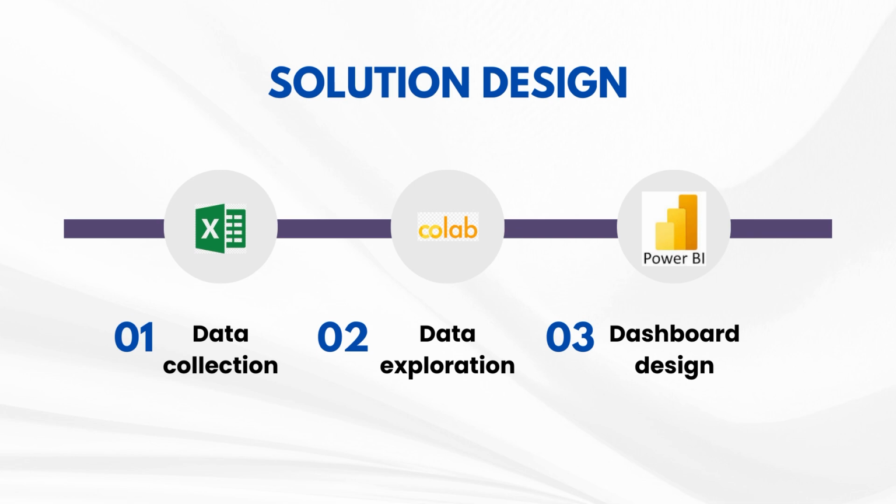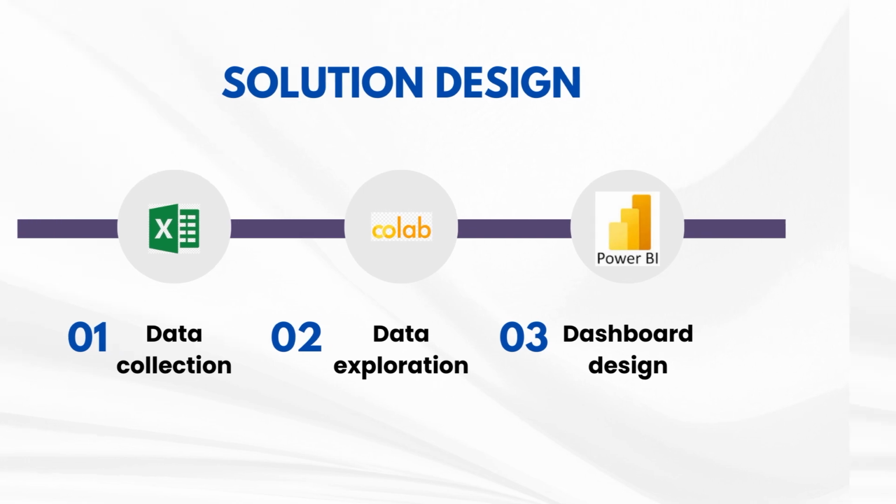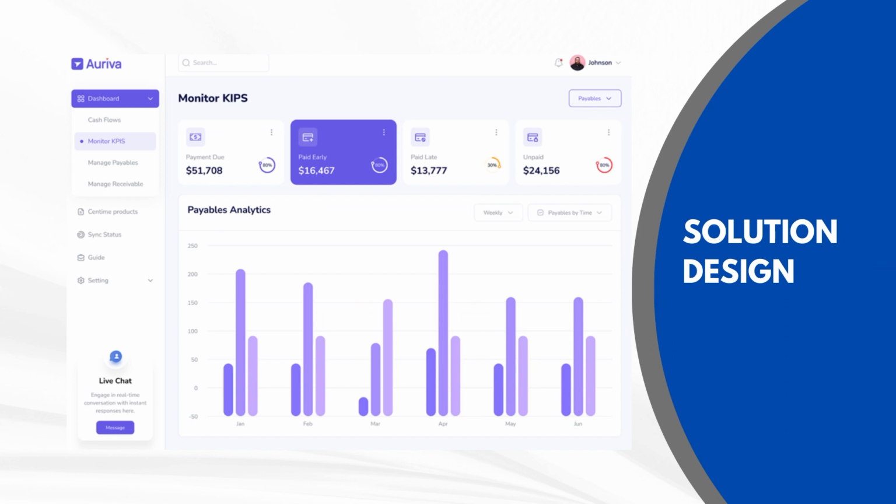It helps to check the data structure, including number of rows and columns, as well as identify missing values, outliers, and potential errors in the dataset. Next, the dashboard design will display a summary of all ongoing construction projects, including project names, location, and status such as in progress, complete, or delay. Then the most essential KPIs are financial data such as project budget, actual cost, cost variance, forecast, budget list, accounts receivable, and accounts payable. This is an example of our dashboard design. There will be a menu on the right hand side.